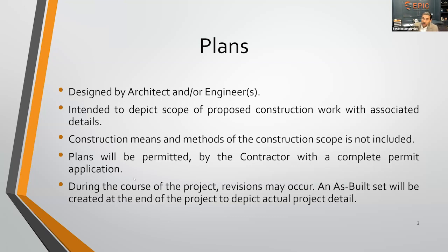Now, during the course of the project, plans will change, plans will develop. So if you were to look at any project historically, you will see a permit set. If you would pull a records set from the plan or pull a records file from the city, you'd have a permit set, you'd have a record set, and likely several different sets leading up to that record set.